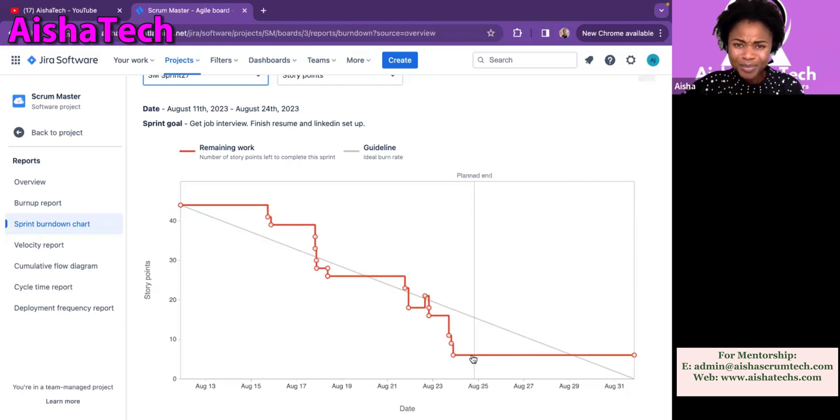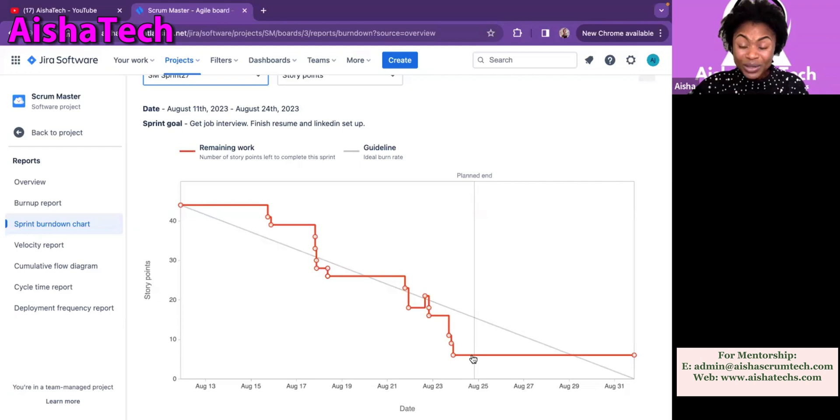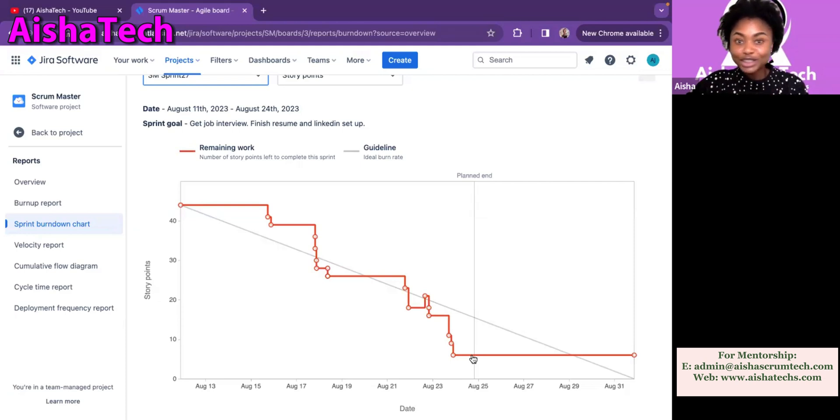Then for a while there was a flat line. Then the team started closing tags again. But the team also went on and had another scope change — the line went up, meaning they added to the sprint. After the scope change, the team started doing so well — they started closing all their tags to the point that they had only one story point remaining. They closed their tags until the planned end area. But on the actual day the sprint was supposed to close, the team had one story point remaining. Looking at this chart, I could tell that the Scrum Master did not close the sprint.